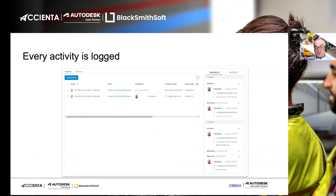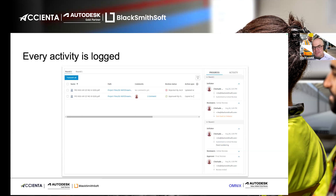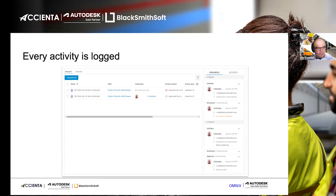The activity log in ACC is important because even if you are the administrator, you cannot delete or alter those records — they are cast in stone. Any person who moves a document, approves it, or rejects it — every activity is fully logged with the date and time. This enforces accountability, and Autodesk holds all the required security certificates to verify this data.